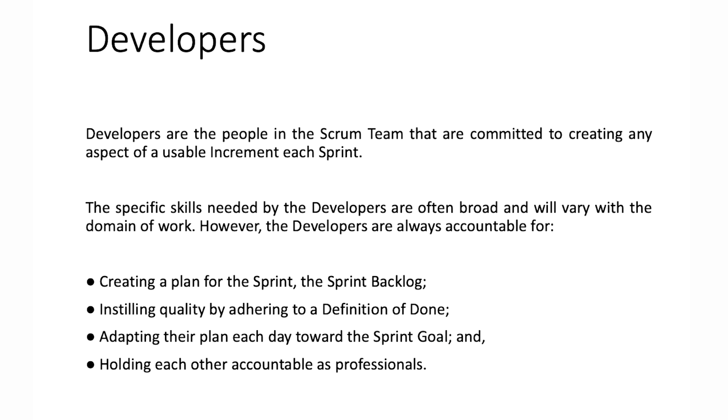So developers are the people in the Scrum team that are committed to creating any aspect of a usable increment each sprint. So the specific skills needed by the developers are often broad and will vary with the domain of work, but the developers are always accountable for creating a plan for the sprint, the sprint backlog, at the beginning of each sprint, instilling quality by adhering to a definition of done, adapting their plan each day towards the sprint goal, and holding each other accountable as professionals.